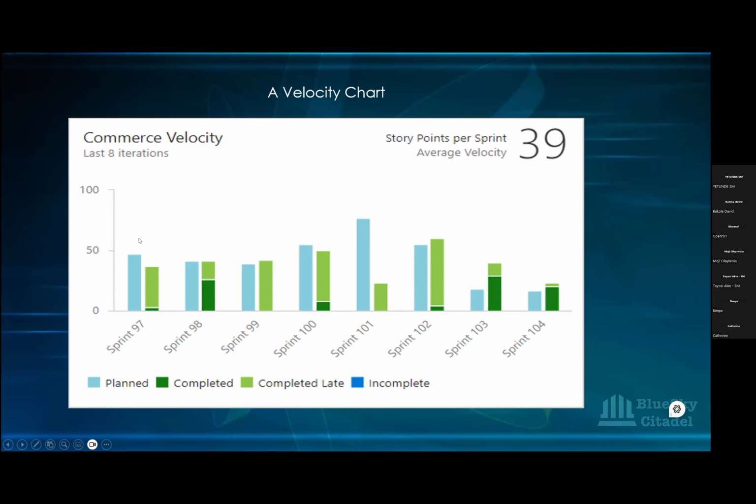So let's look at the first sprint that they worked on. They were able to commit to about less than 50. That was the plan that they were going to do. And you can see that they did about 40, let's assume 47 was what was completed. And because of that, in the next sprint I wouldn't expect them to still go to either 50 or 49, because here tells you what you've completed. If they are still at full capacity, the average velocity during this time would have brought it down. It won't tell them that the average velocity is 40 something, because it's looking at what they've completed. So it will bring it down for them.